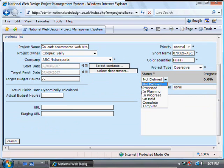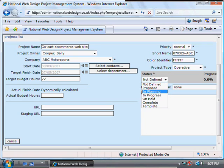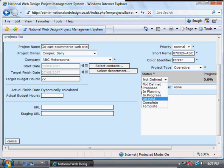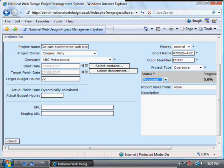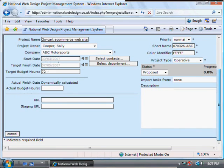The status of the project — at the moment this is a proposed one. If it was already ordered it might be in the planning stage, or if already underway it might be in progress. Here we're putting it in as proposed. If a project is proposed and then not ordered, it would go on hold. The actual budget you'll add in once it's been ordered and you know how many hours of work are going to be done.